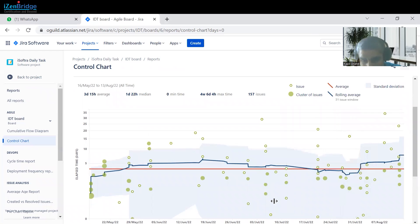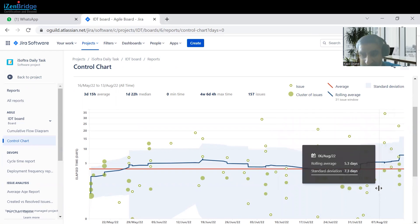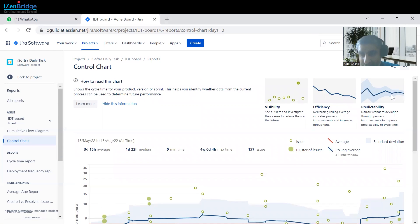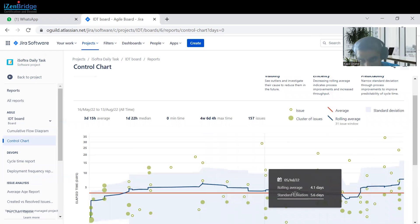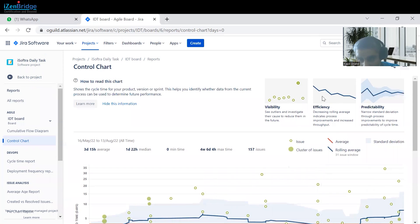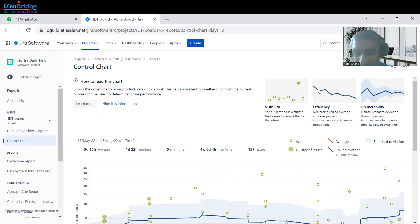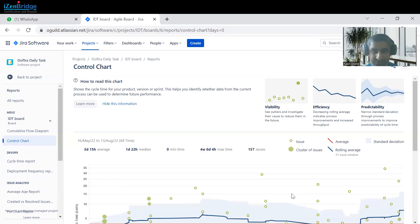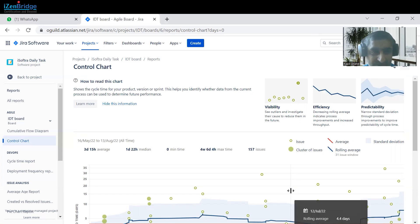If the standard deviation becomes very consistent and this chart shows a narrowing pattern, it means we are improving our predictability. If this blue line — which is the rolling average — is moving in the lower direction, it means our efficiency is increasing: we are taking less time overall and completing our tasks in a better sense. This is our control chart. If you have any questions, post a comment on this video and I will try to answer those questions.